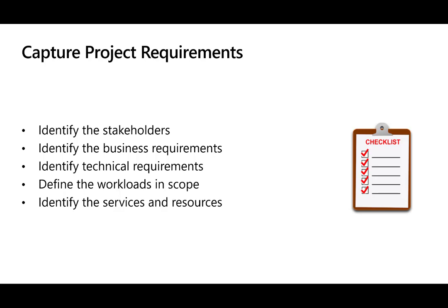And then after you have identified your requirements, you will want to define the workloads that are in scope to use cloud services and identify the services and the resources you are going to use. This effort will include evaluating and comparing service options in order to select the best services to meet your requirements. When you have listed all of the requirements, services, and resources for your project, you can then begin to estimate your cost.